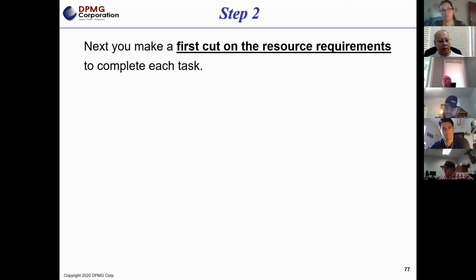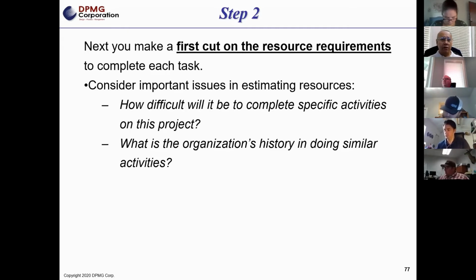And again, our approach, and this is really the approach you should take, is not using names when we start out looking for what resources we need. We need to look at the work that needs to be performed and determine what skill level we are required to complete that task. So again, as part of this, we're going to have to look at the task itself and determine how complicated this is, because we're going to have to come up with an estimate.